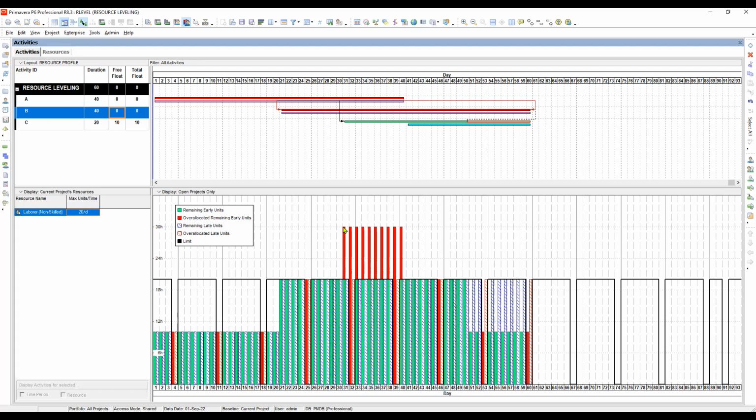And the over allocation is located in here because this has the maximum competing activities. Meaning this one has 2 competing activities, but this one has 3 competing activities. Now, if you add this one, it will give you how many? 10 units per day, 10 units per day, so it will give you 20 units per day.